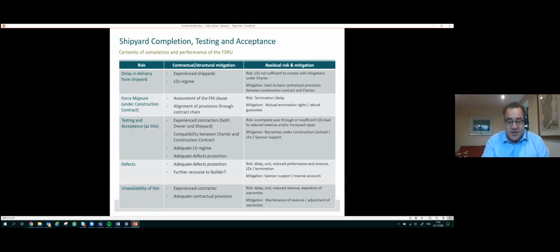Now, as previously mentioned, title in the FSRU will ordinarily have passed from the builder to the FSRU sponsor upon delivery of the FSRU from the builder at the shipyard. And so the FSRU sponsor will look to the terms of the construction contract and the builder to rectify any defects that are determined during the testing of the FSRU whilst at the project site, which may entail the builder being obliged to pay liquidated damages during the time it takes the builder to rectify such defects.